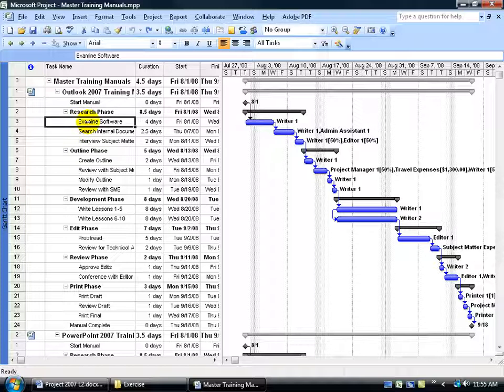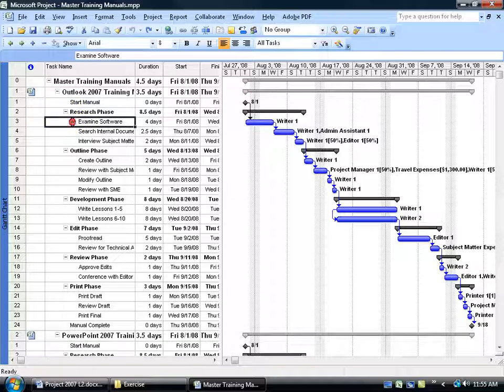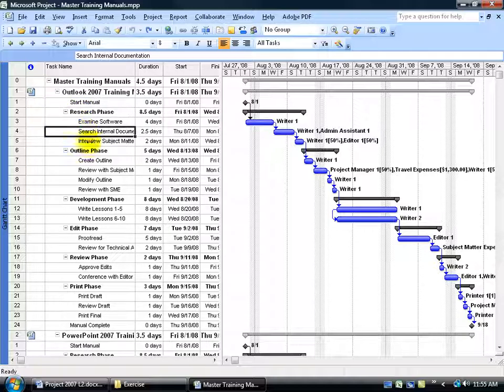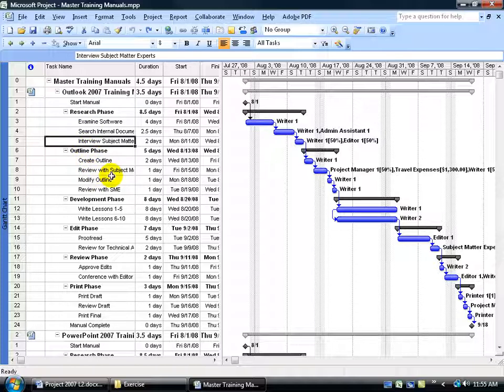I could define it by adding outline numbers, saying this is 2 and this is 2.1 as a subtask or derivative of the summary. 2.2, 2.3, then we go to 3, 3.1, 3.2, and so on.